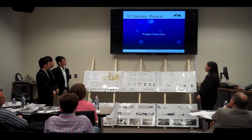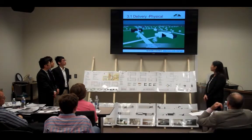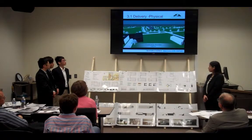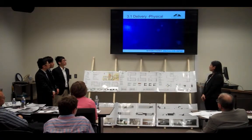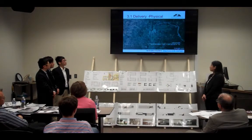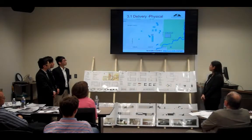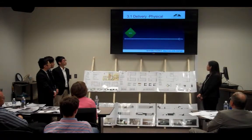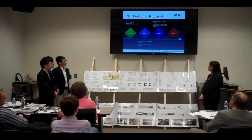This is a video presentation for the Rural Trade Academy project. To achieve better collaboration among owner, general contractor, and architect from early design phase through project completion, we use IPD as the delivery method. This project contains new construction of the school, the red barn, and dormitory, as well as the renovation of the clubhouse. The location is 5439 Bonner Avenue in Fort Worth, Texas. The red line is the boundary of the site. This diagram shows the location of areas for storage, staging, sanctuary, and lay-down, and the blue area shows the road for transportation. This diagram also shows the milestone activity of the schedule — the project starts in 2015 and ends in 2018.